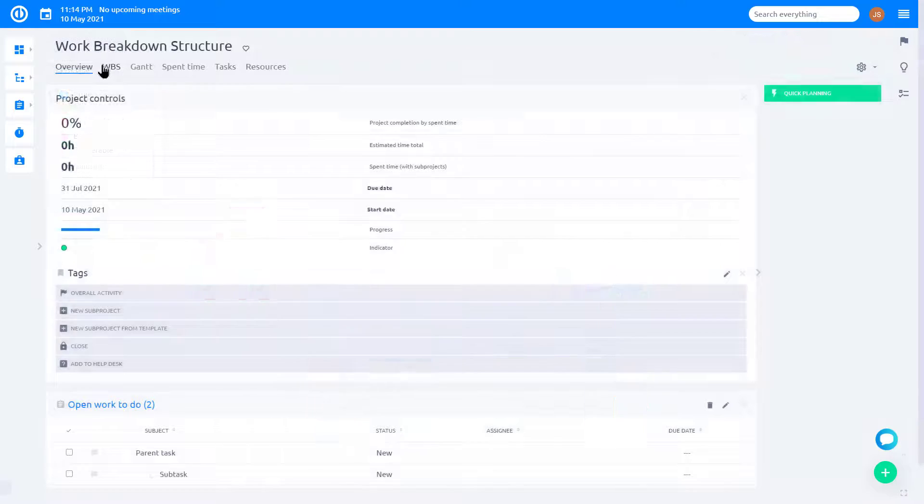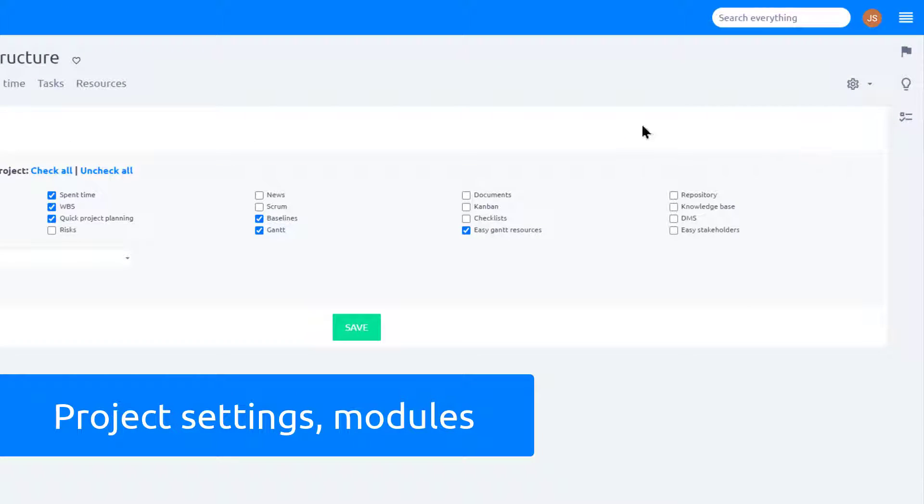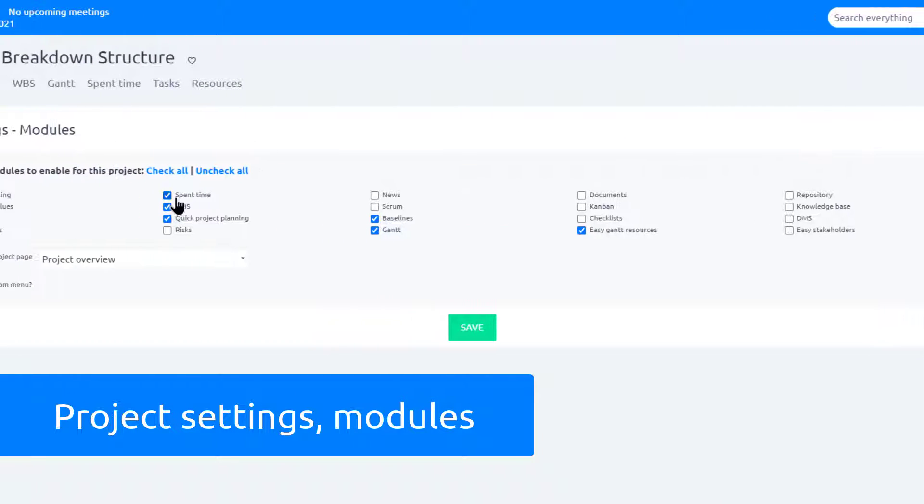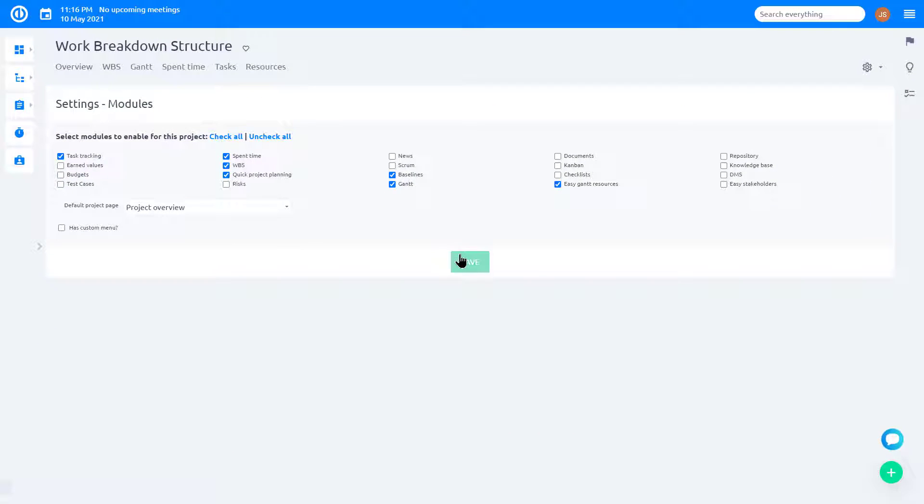To add WBS module to your project, go to Project Settings, Modules. Choose WBS module and click Save.